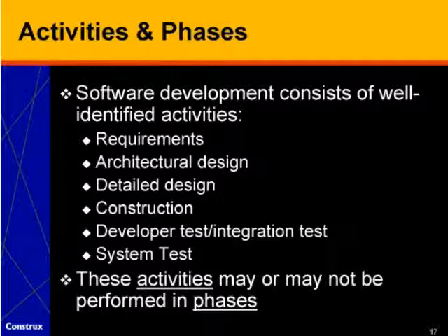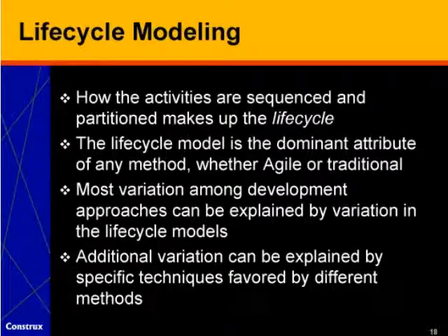Now, when we talk about these distinct activities, sometimes people assume that because we're talking about distinct activities, that implies that these activities must be done in phases. And that really is not the case. I think it's extremely useful to discuss these as distinct activities, regardless of whether they are broken into distinct phases or whether they are done in a highly overlapping manner. And that brings us to the topic of lifecycle modeling. Lifecycle modeling refers to how activities are sequenced and partitioned into a life cycle.